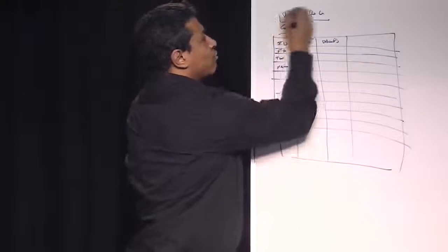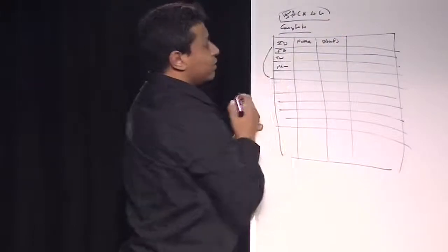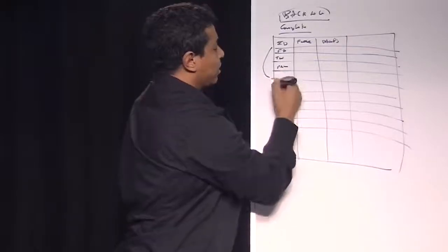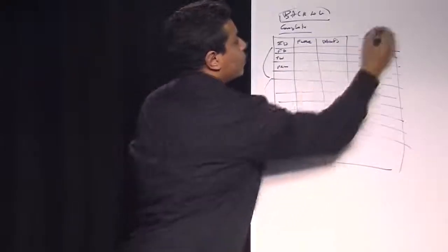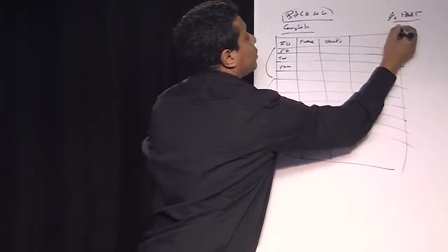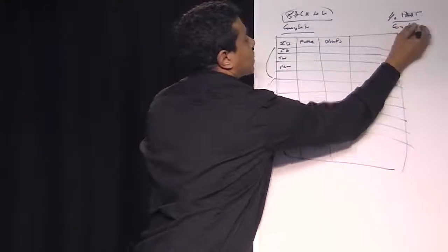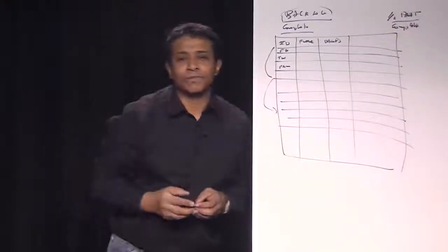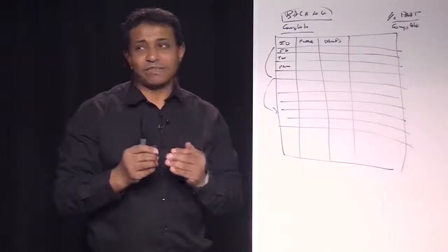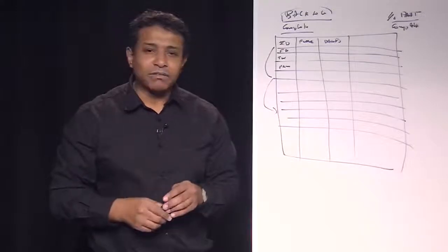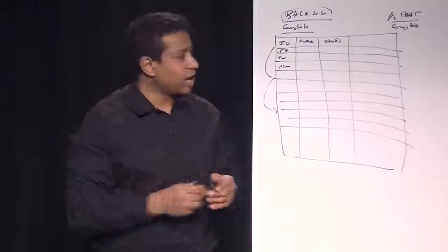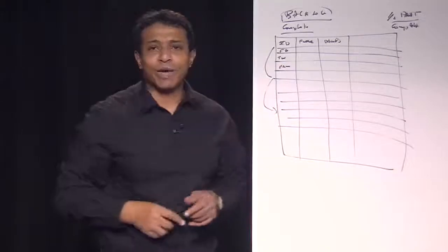This is the job of the product owner. He can do only this first part, saying, okay, I'm waiting, it's got to be done to build the other one, or he can do the half part, or he can do the complete one. By experience, to get the overview, it's just better for him to do the overview first and to cut by items with the Scrum Master right after.